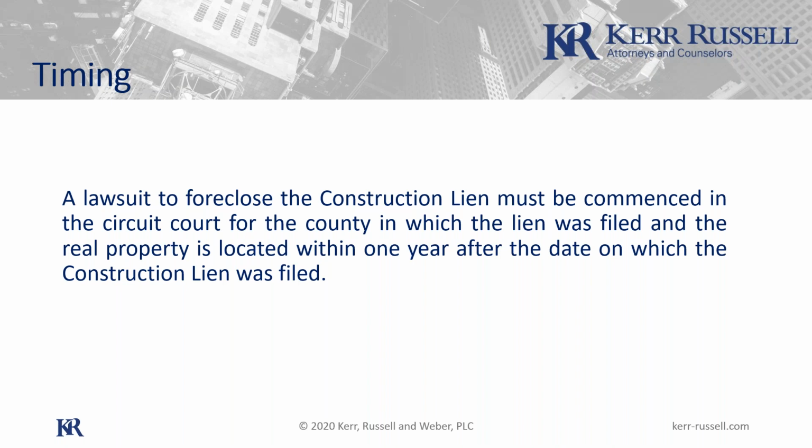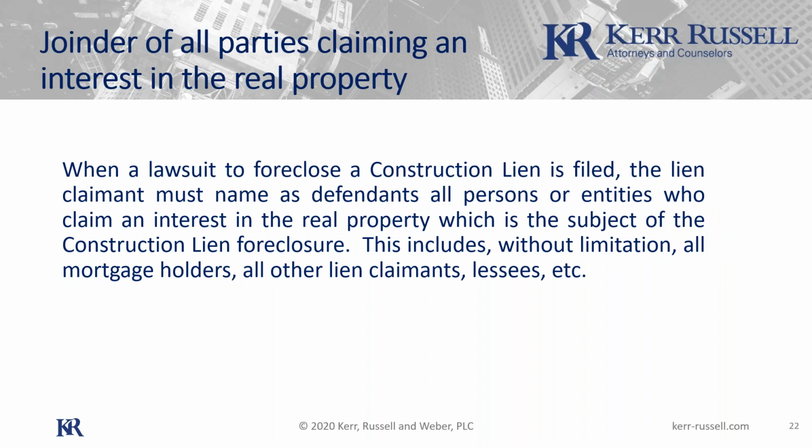That's good for you to be aware of, but usually at that point you've got this in the hands of your attorneys. Okay, let's move on. When you do start a construction lien foreclosure suit, one of the requirements of the act is that you name everyone else that has an interest in the property. So in my example of the plumber liening my house, he would have to name Bank of Ann Arbor because they would show up on the title search as having an interest. And again, this is a little bit more for the lawyers probably than you folks. Okay, let's move on.